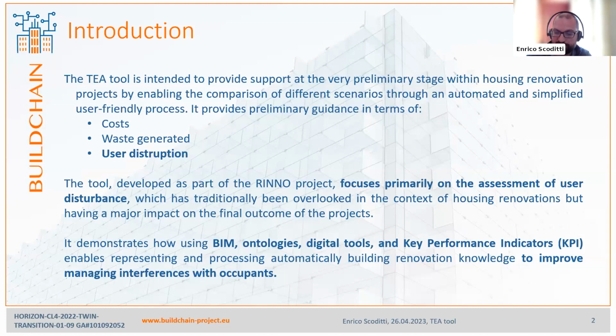When occupants are present in the renovation site, disruption due to noise, dust, vibration, odor, and demolition debris should be reduced as much as possible. The cost of renovation project should include the added cost caused by disruptions, so as to enable the project manager to evaluate and compare different retrofitting scenarios and decide about the best retrofitting strategy to be implemented.